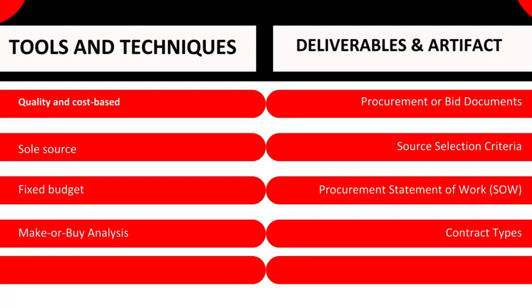For example, a software development team is working on a project to develop a new mobile app. The team needs to purchase a license for a specialized software development tool. There is only one company that sells the software development tool. Therefore, the team leader decides to use a sole source procurement method to purchase the license.